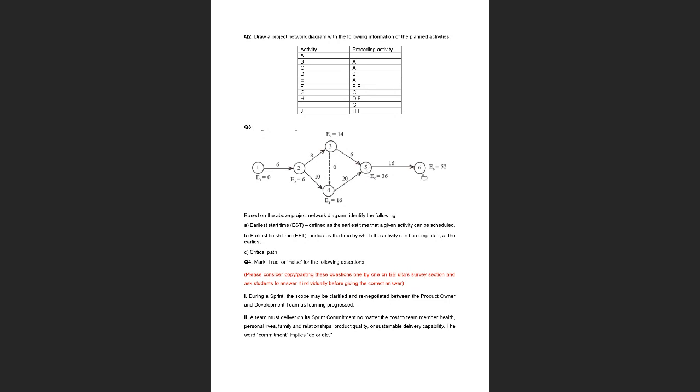All right, next, what is the earliest finish time for activity 5, 6? Yes, 52, and that is what 52 is for you. Someone was asking, right? So this is what 52 is. If you're asked to find the early start time, we are just dealing with the starting numbers. If you're asked to find the early finish time, then we come to this finish node. So just ignore the number here. It's kind of a mix up.